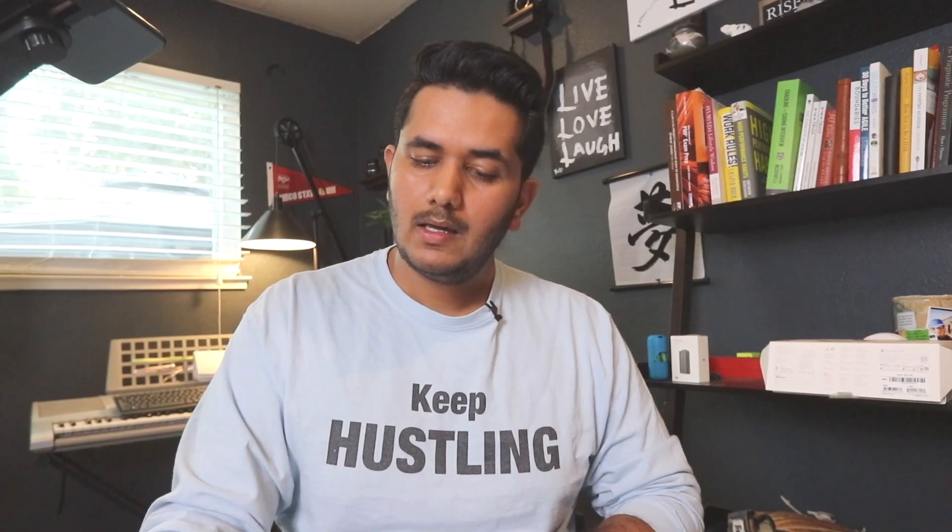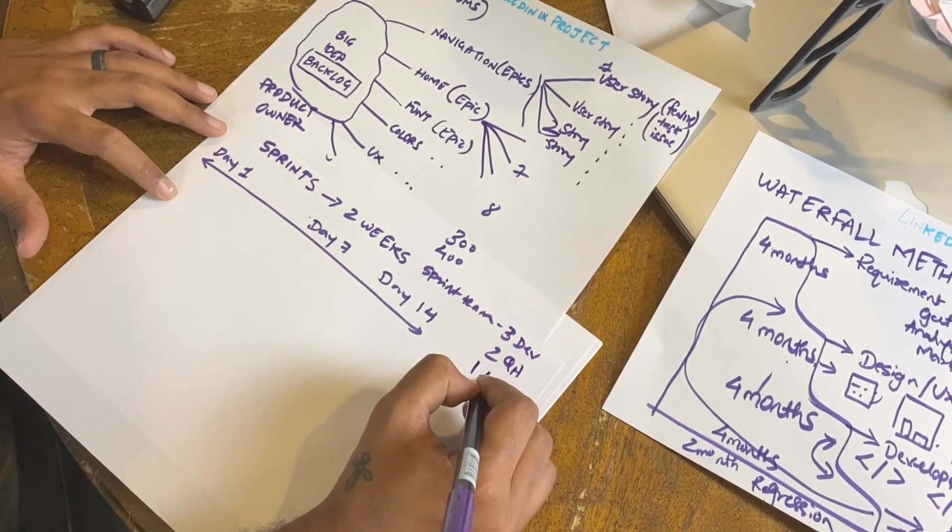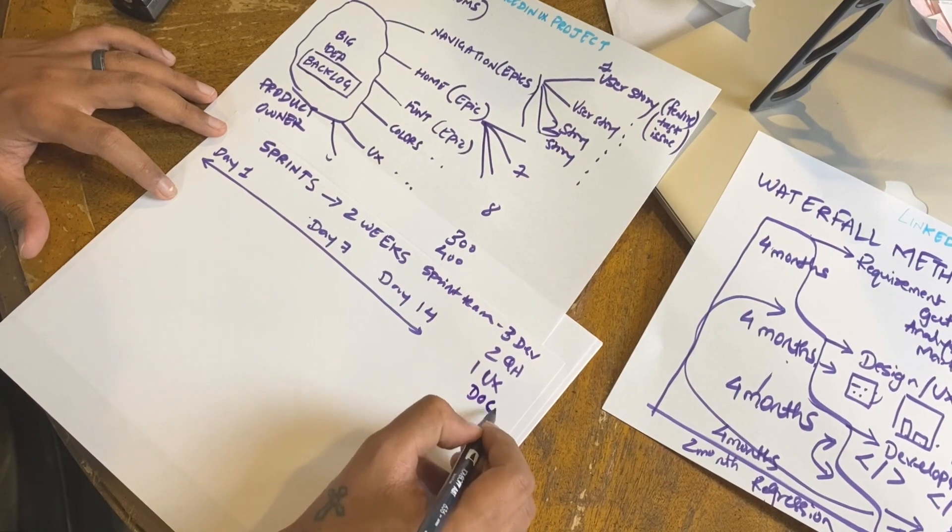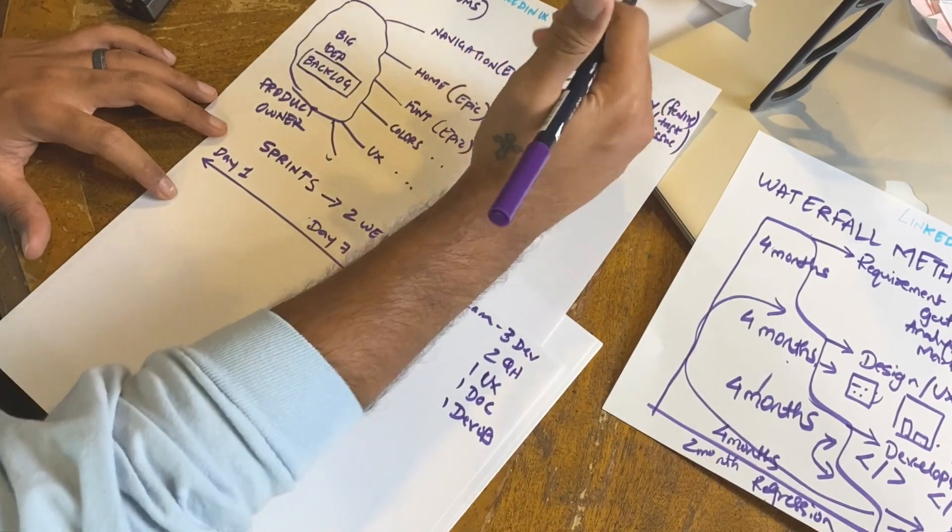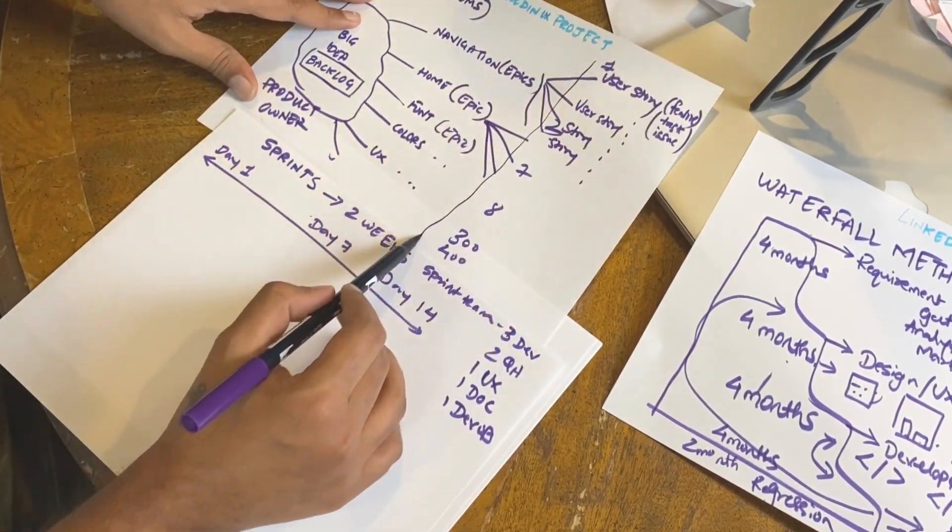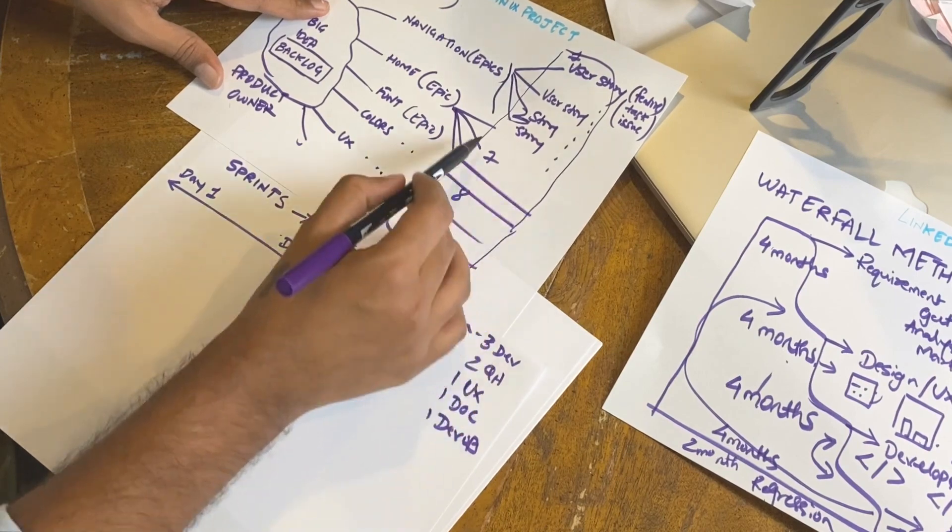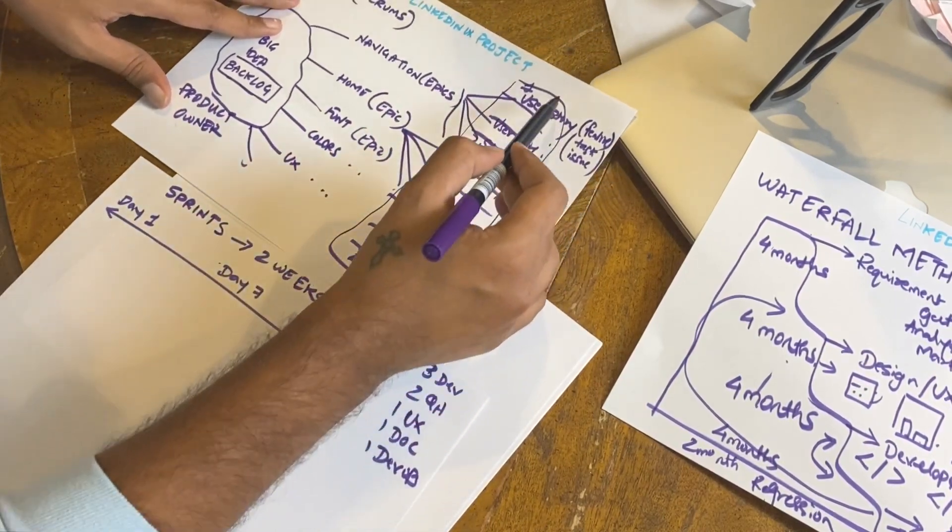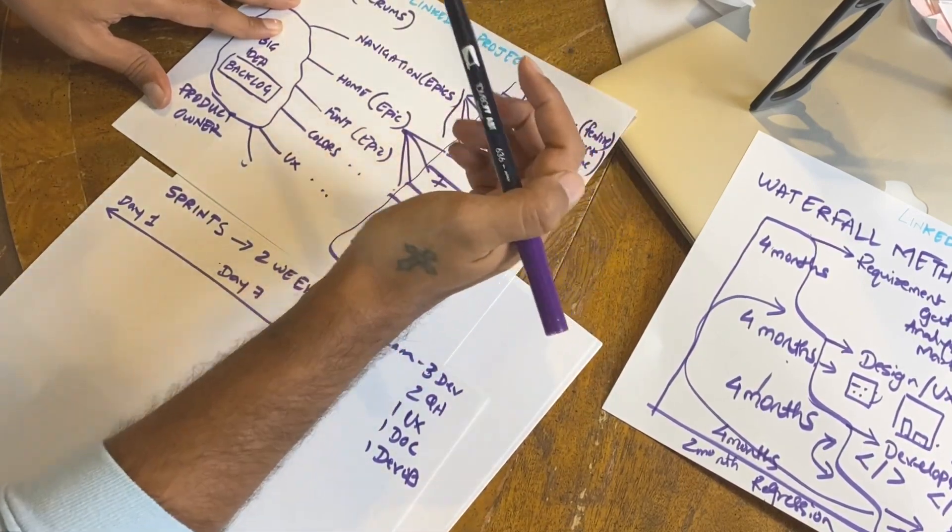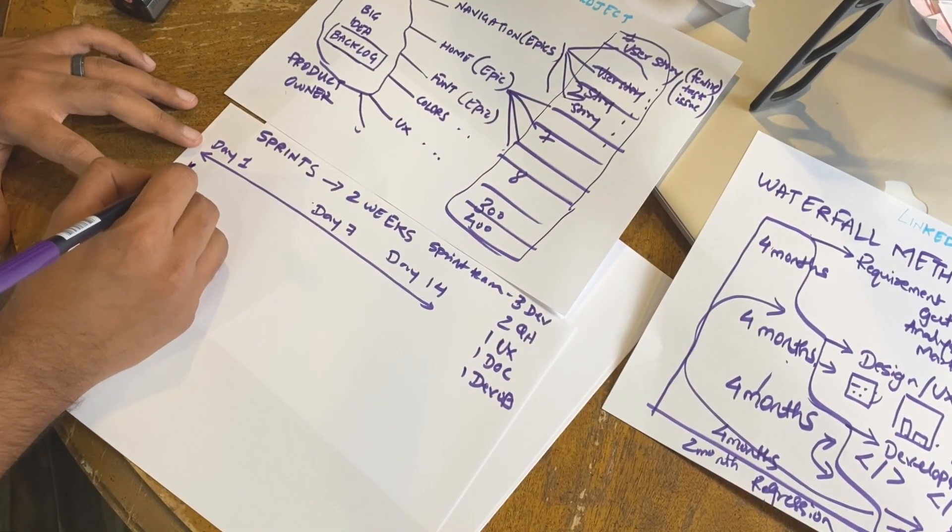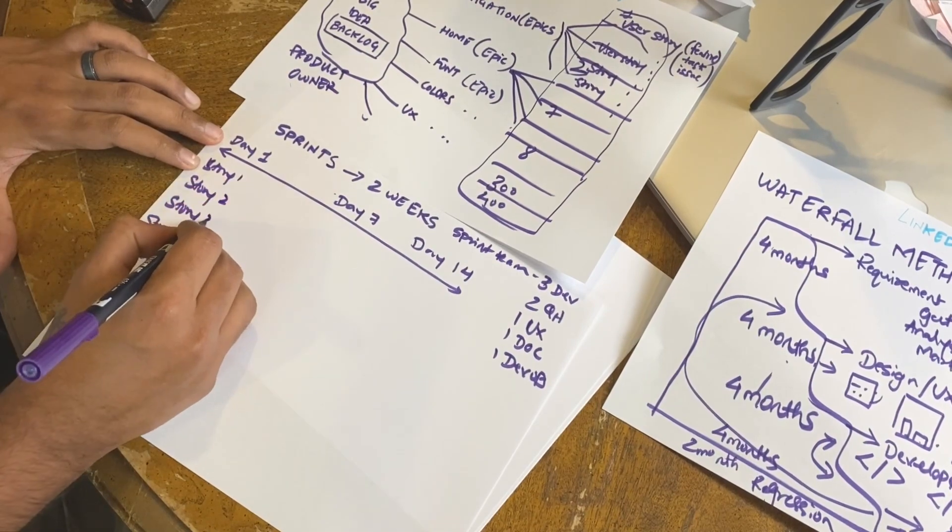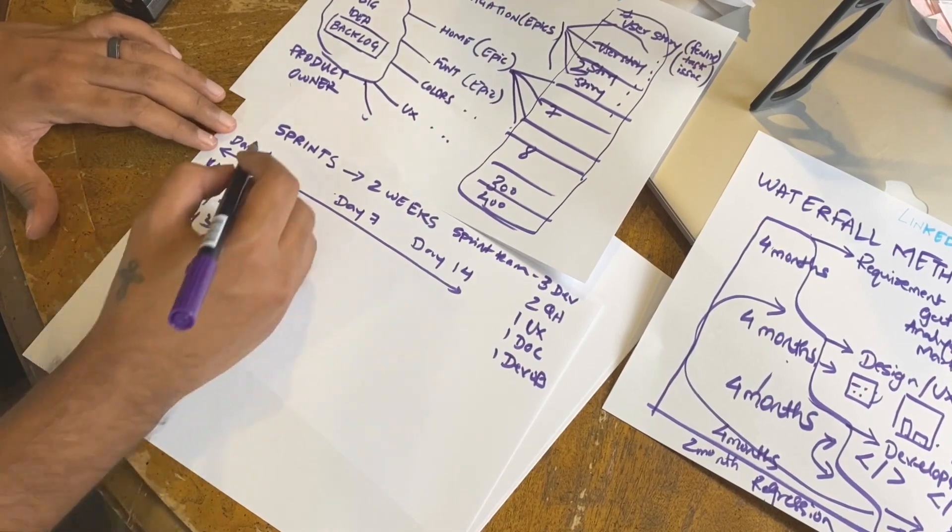Sprint team is three devs, two QA, one UX person, a DevOps team. In sprint planning they calculate and estimate how much work they can get done. Product manager has decided this is the backlog - this entire thing is the backlog of user stories. This is the amount of work. Product manager has descended from top to bottom and is like, how much ever you can pick, decide what you want. So they decided we can do five user stories. They decided this is the user stories they can go with. They all picked it up.